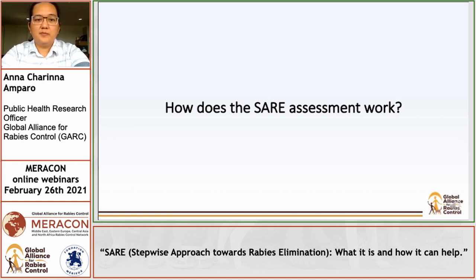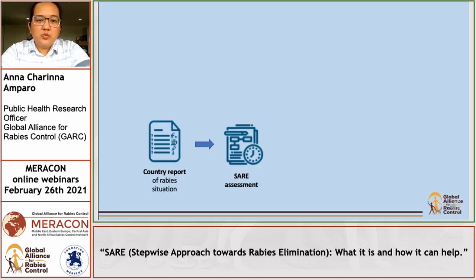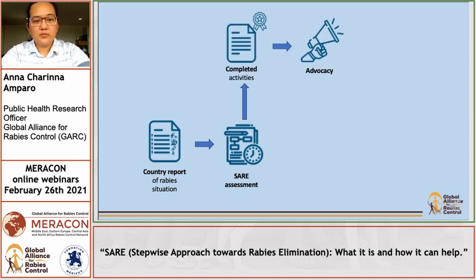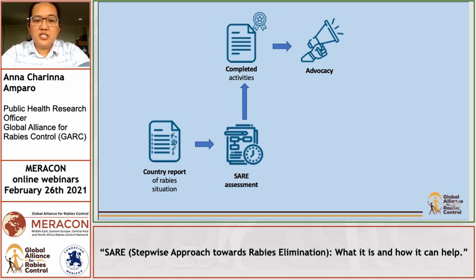So how does it work? Initially you would be asked to complete a country report. The country report will include details of rabies-related activities and status from different sectors of the government. This report will help you answer the SARA assessment more efficiently. There are three major outputs of the SARA assessment. The first is a list of completed or accomplished activities, which can be used for both advocacy and lobbying for acquisition of funding required to ensure progress towards rabies elimination.